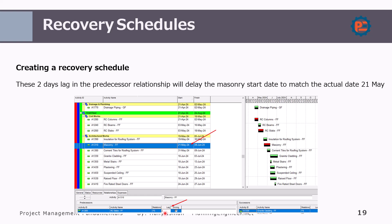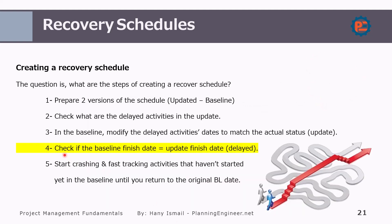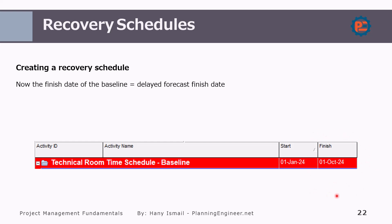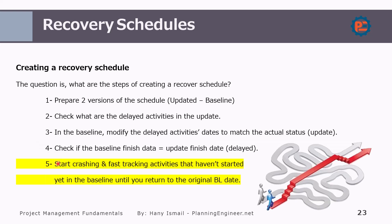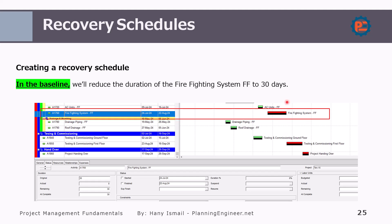We can also change the duration of the activity to make the finish date match the updated finish date. Now we check if the baseline finish date equals the updated finish date. Here we have the finish date as 1st October. So the finish date of the baseline now equals the delayed finish date. What we need to do next is start crashing or fast tracking — or maybe both — for activities that haven't started yet. For activities already started, I can't control them. So in our example, we go to the not-yet-started activities and start reducing the duration or applying crashing or fast tracking to ensure the forecast finish date matches the baseline date.